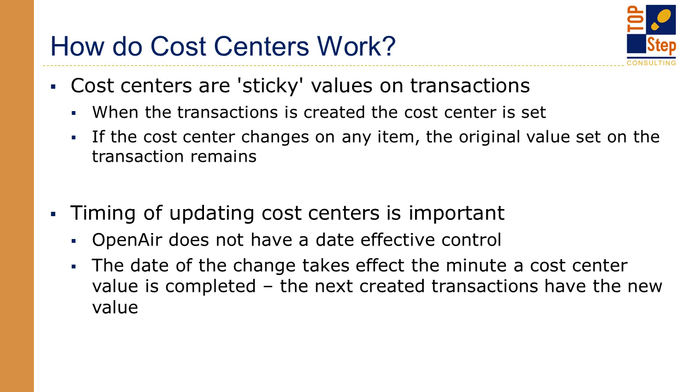Now, if a user's cost center changes, for example, the timing is very important of when it is effective and how to apply that change. There is no date effective way to say when that change takes effect. So the minute the change is made, the next transaction created will have the new cost center.